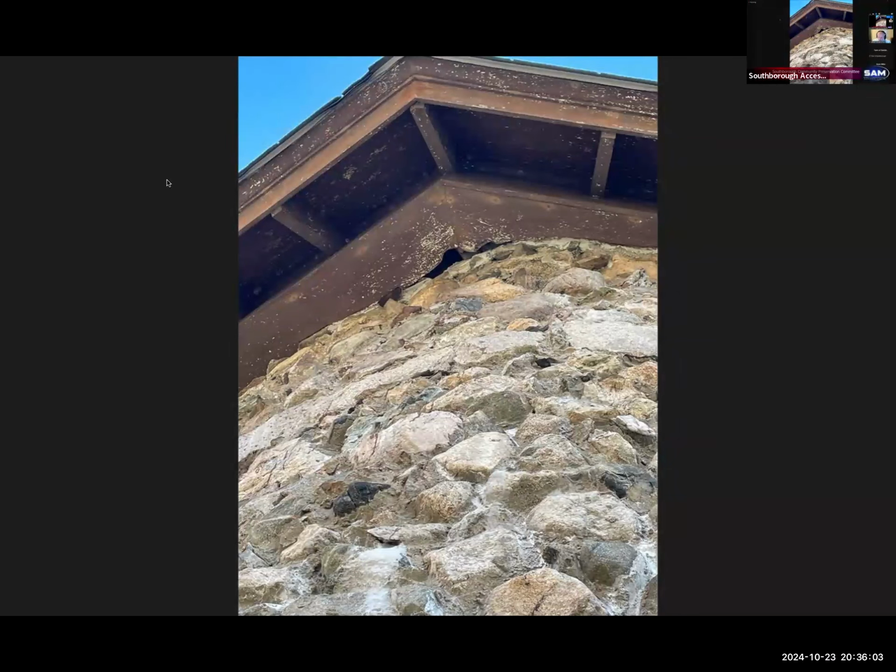Of course, it needs the soffit, the rafters that you can see. This has exposed rafter tails that come out from underneath, and you're looking up under the roof. That said, you always have to have the caveat that you don't know until you get in there what you're going to find. Once they start tearing things down, you might find some deterioration in some rafters and soffits, maybe some of the sheathing up top needs some work, but for the paint loss, for instance, that photo looks pretty good.